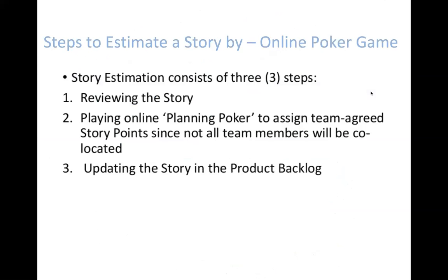The poker game is a team game where, during our planning meeting, the product owner describes the requirement or user story and discusses the acceptance criteria for the delivery part. The team discusses it with each other, and then they play the poker game. During the poker game, every team member has to showcase a number, story points. It's either Fibonacci series, t-shirt size, or maybe odd-even numbers, to calculate the estimate and the feature release.